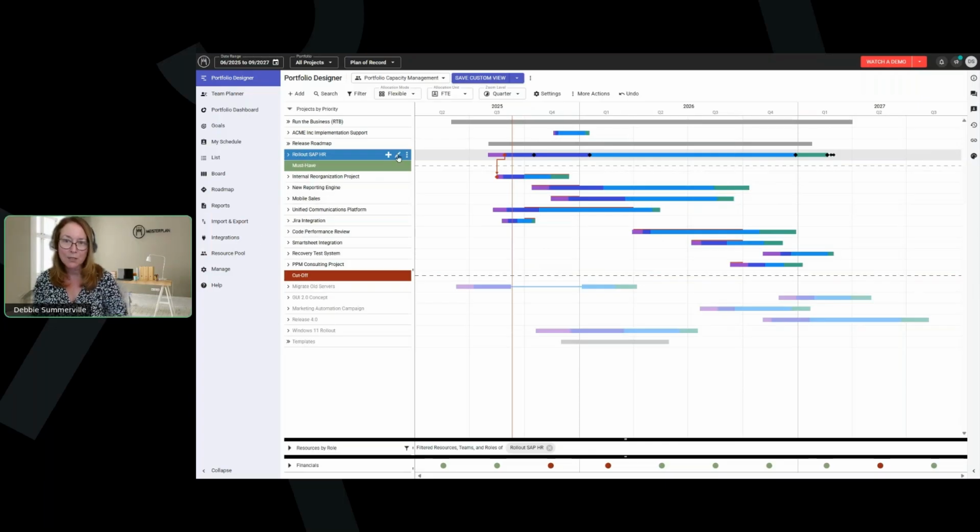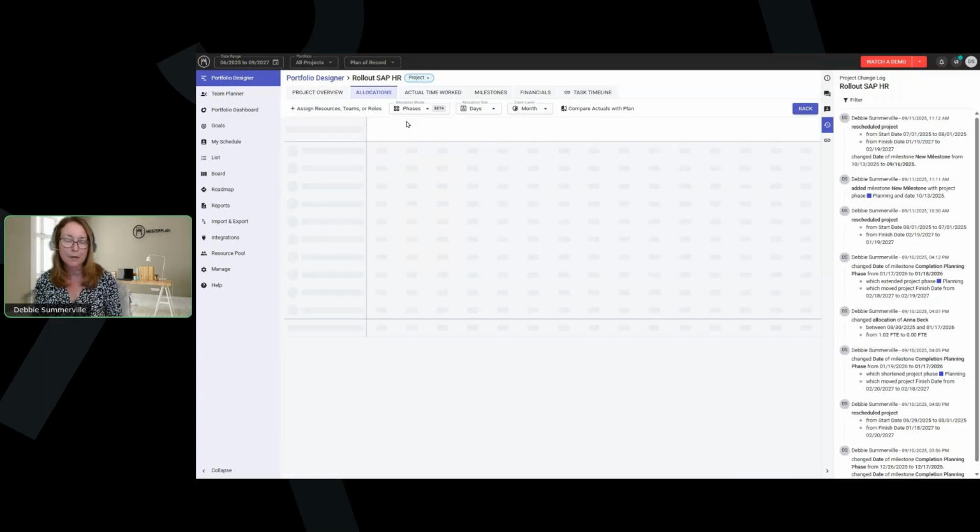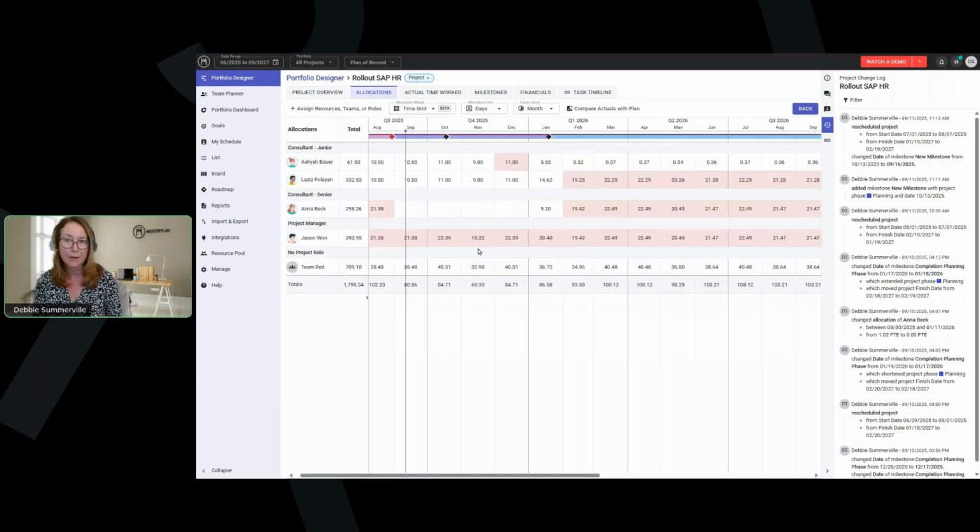All right, so now let's go into project details where the majority of the deep dive is going to be. In our traditional time grid allocation mode, right away after you enter the beta, you'll see an improvement where the Gantt is being shown, the milestones are being shown. If you hover on the milestone, you see some of the milestone dates and the phase it's in, as well as the status. The other improvement right away to this Gantt visual is you can see that broken dependency with a red.